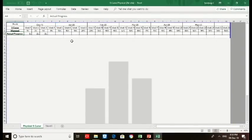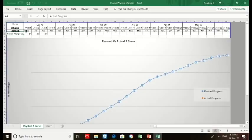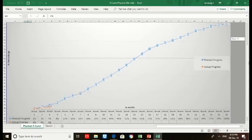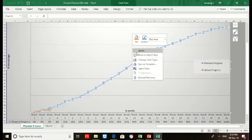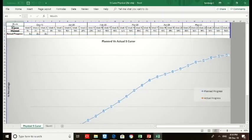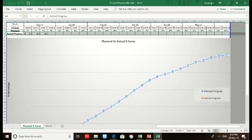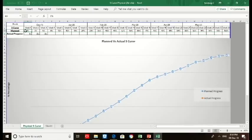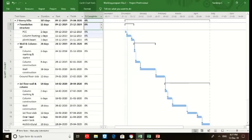So we have a pre-developed Excel file. The format is very simple. This is our format which we created for ourselves. You could see this chart, click on this. You could use a chart and you have to make these columns like month, what is the S-curve, weeks, week one, two, week numbers, and what is the planned, what is the actual. We have copied the plan one from the baseline project. Then we paste over here.